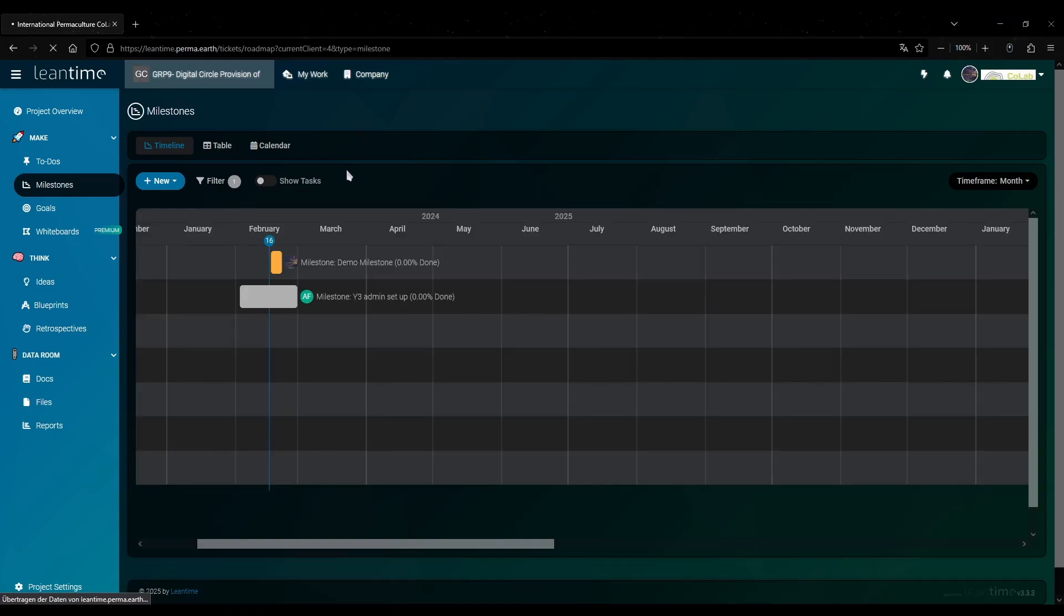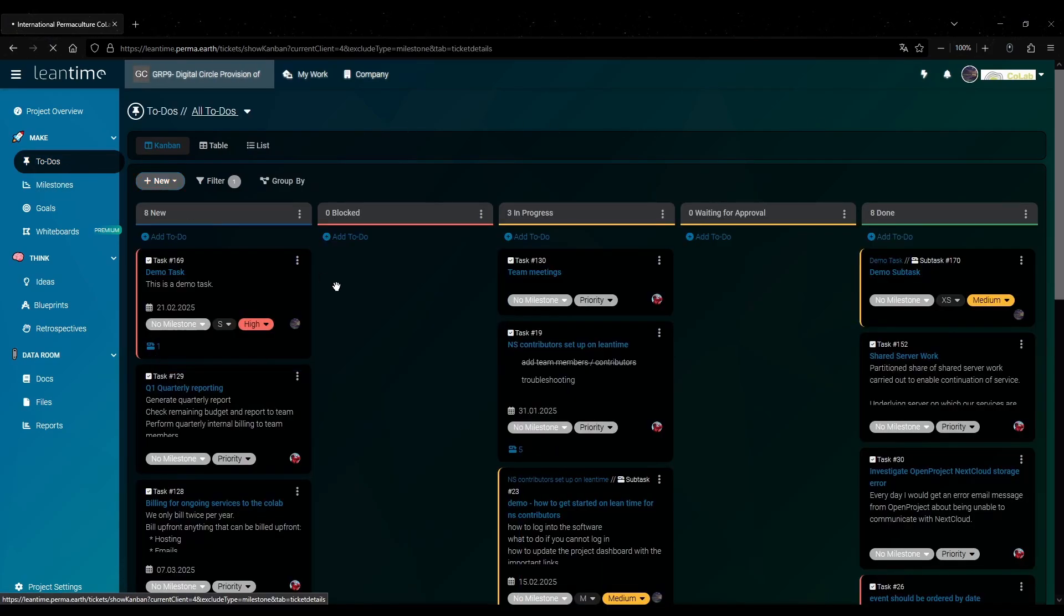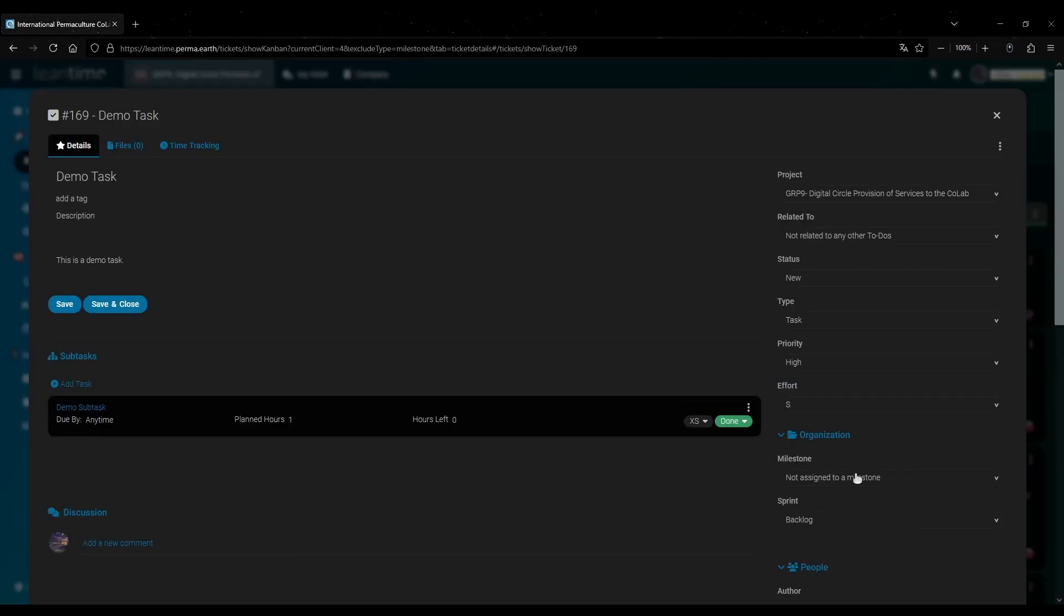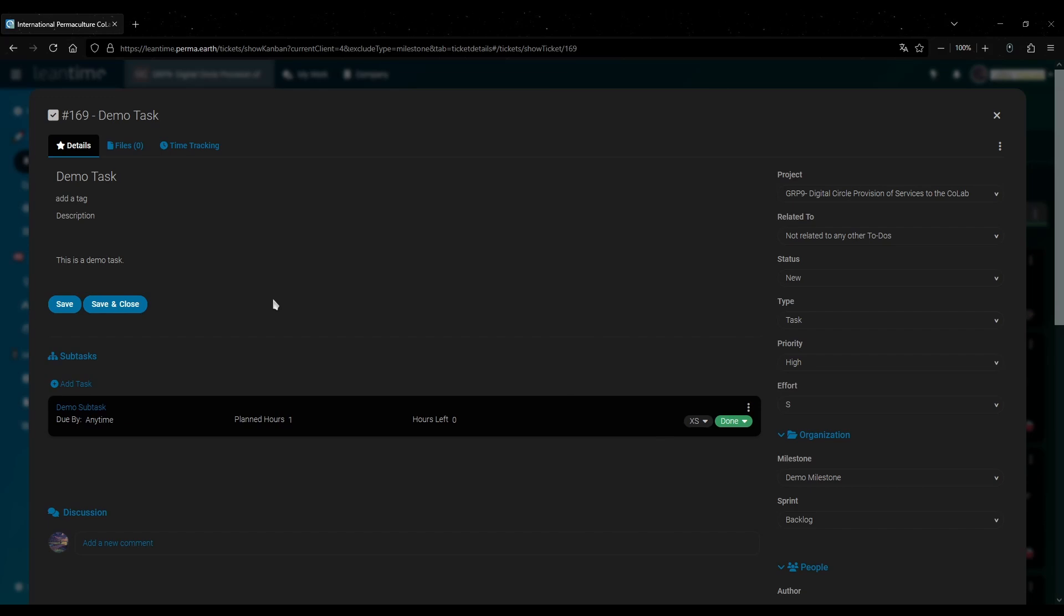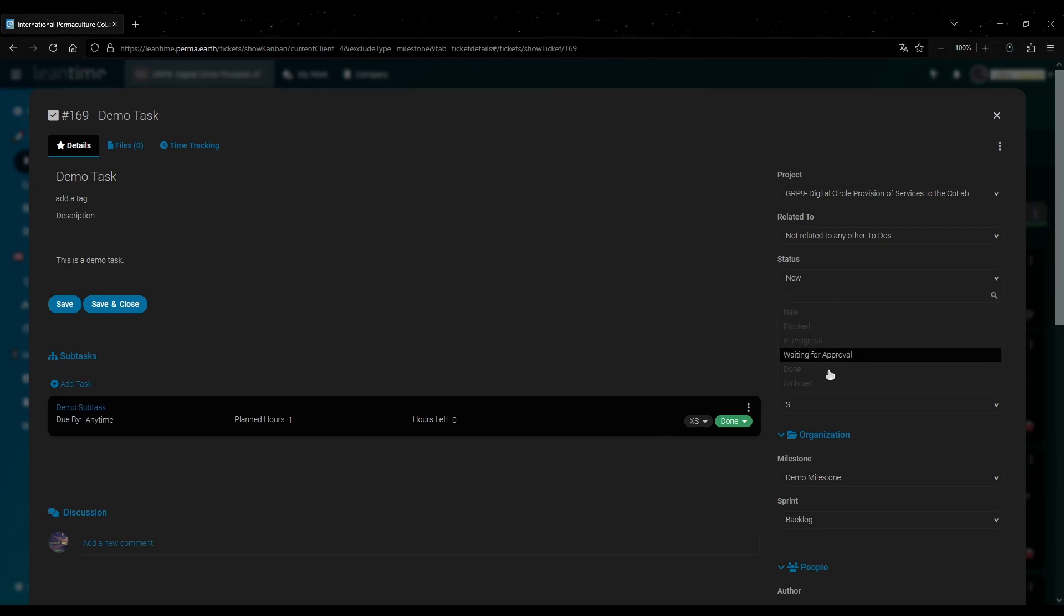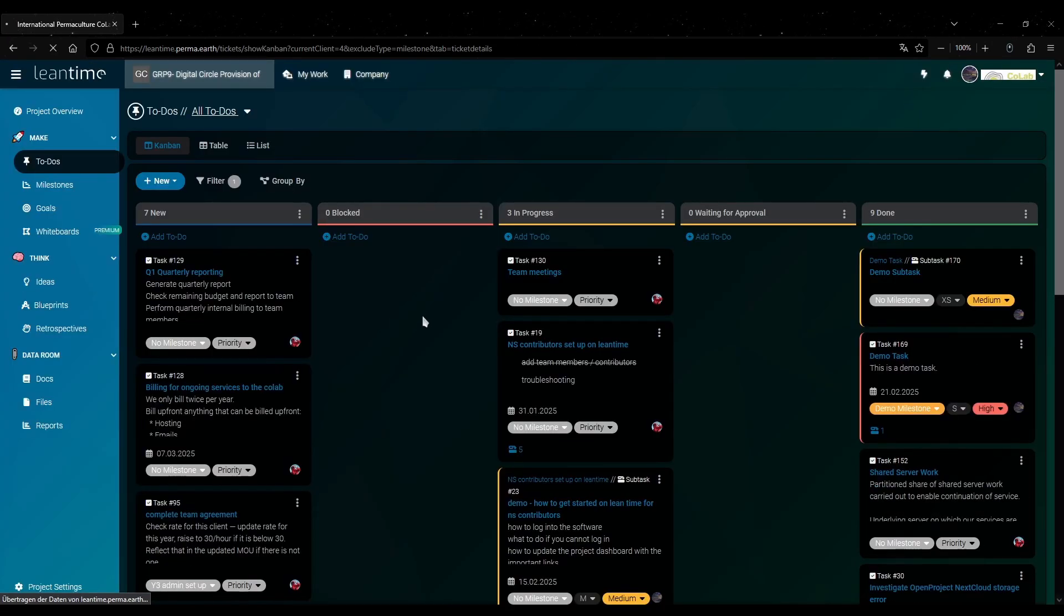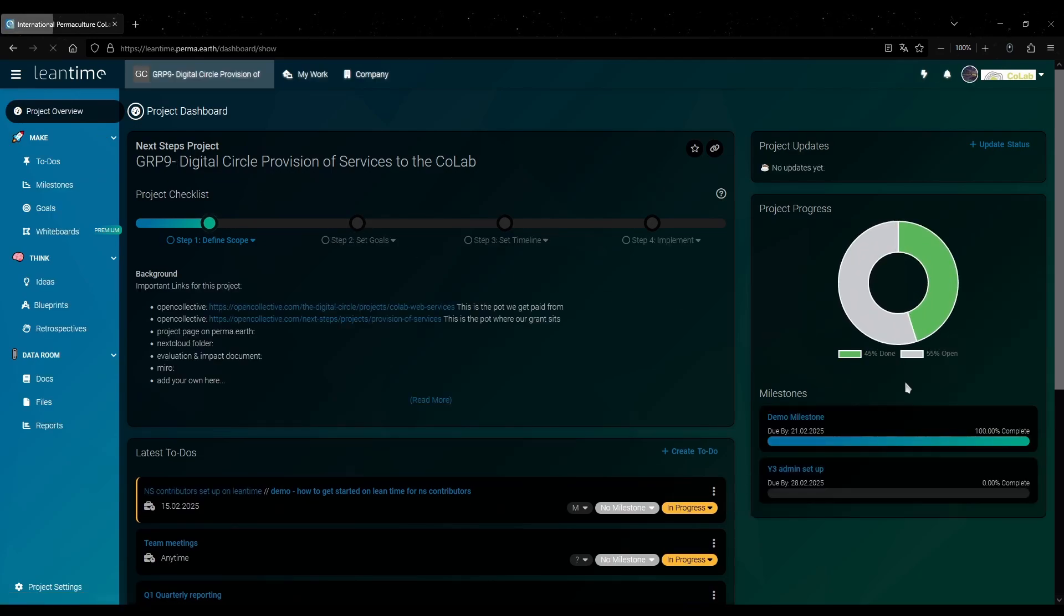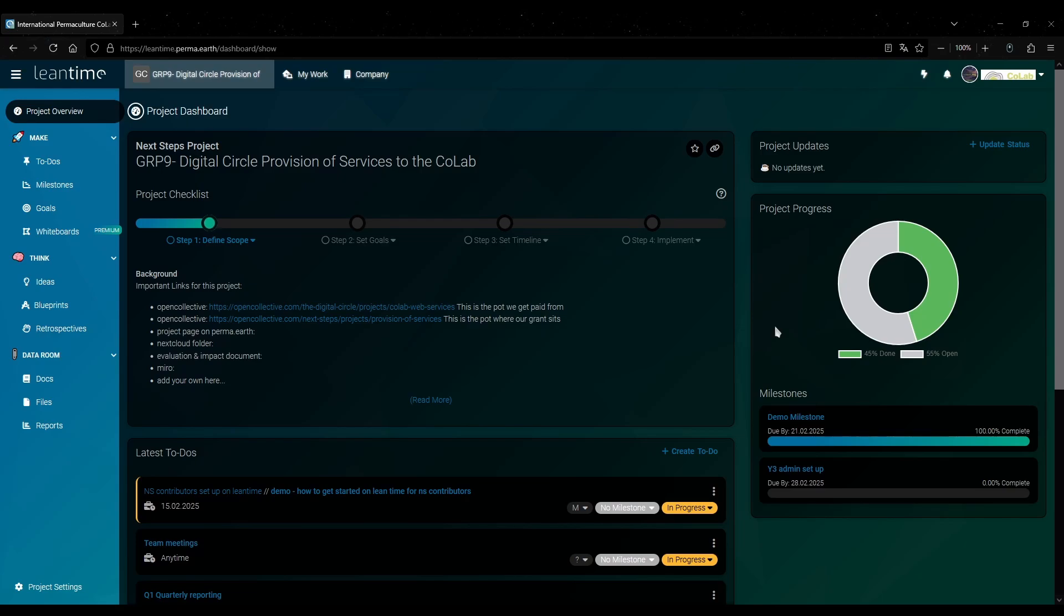Okay and next we will add the demo task we made earlier to this milestone. For that we go to that demo task. And then here on the right we assign the milestone we just made. And then actually while we are here let's also set the status of this task to done. And save. If we can now go back to our project overview. Then we see our new milestone right here and it says 100% completed because all the tasks are done.